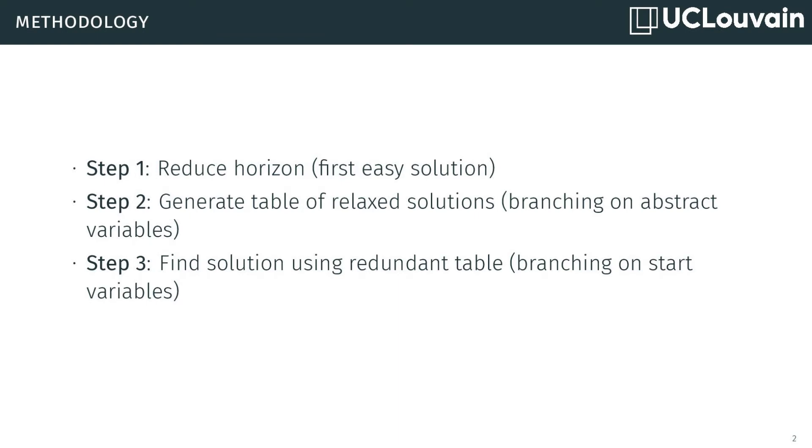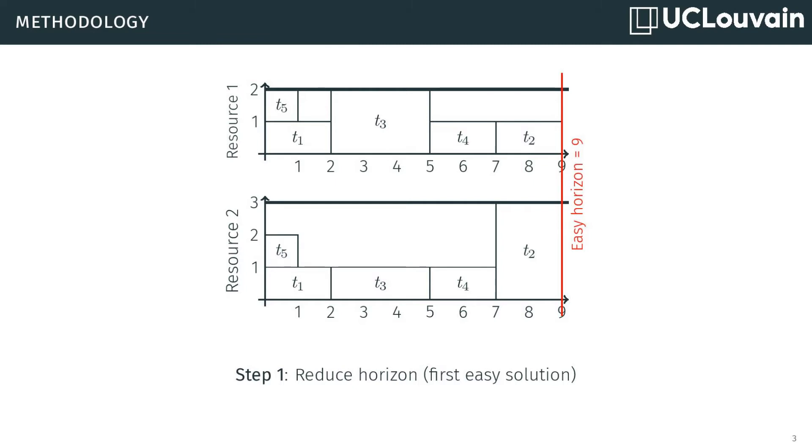Our methodology is simple and organized in three steps. First, the reduction of the horizon, then the generation of the table, and finally the solving of the problem. Let's illustrate it with an example. The first step is trivial. We find an easy solution to reduce the horizon. In the example, an easy solution leads us to a horizon of 9. This helps us consider a smaller start interval when creating our abstract variables.